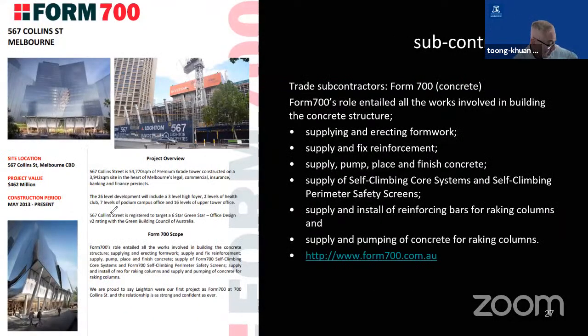Subcontractors. Now, I mentioned previously that many of the main contractors do not actually carry out construction work. All the work is carried out by subcontractors. So the main contractors generally only manage the construction contracts. They will have their own project managers, construction managers, and site managers. They manage occupational health and safety. They have planners and programmers to work on the schedules. But they engage no construction workers. So all the construction workers will work for subcontractors.